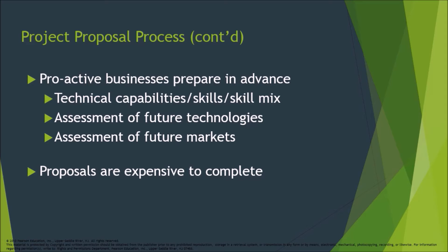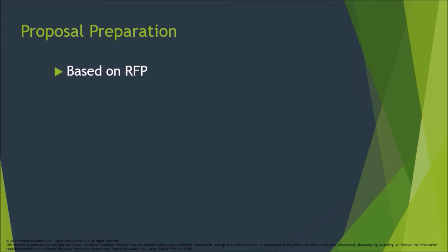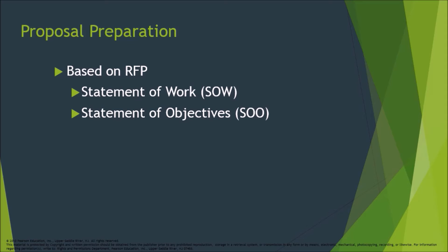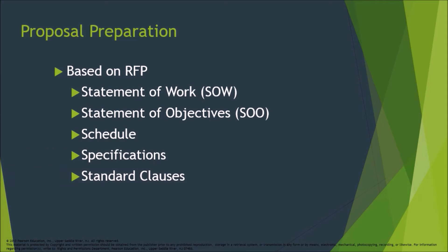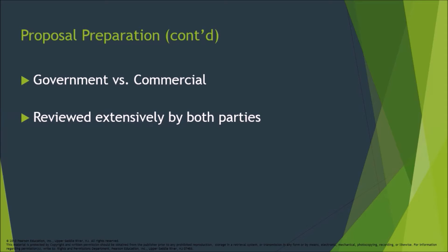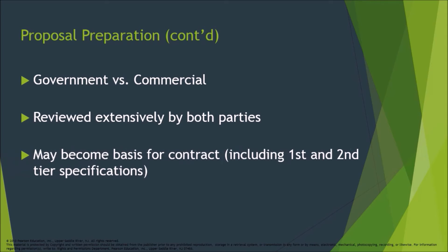Proposals are expensive to complete. Proposal preparation is based on RFP, which includes Statement of Work (SOW), Statement of Objectives (SOO), Schedule, Specifications, and standard clauses — government versus commercial. It is reviewed extensively by both parties and may become the basis for a contract, including first and second tier specifications.